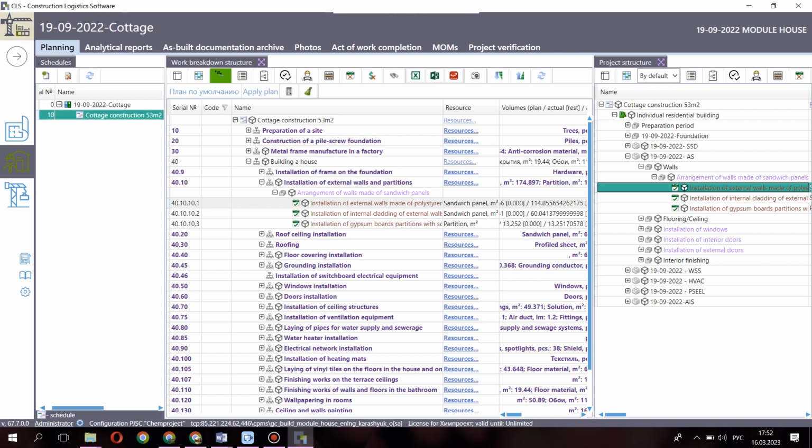Calculation of construction and installation schedule. Before calculating the top-level schedule by forming temporary links between predecessors and successors, we should indicate the sequence of work on the divisions.